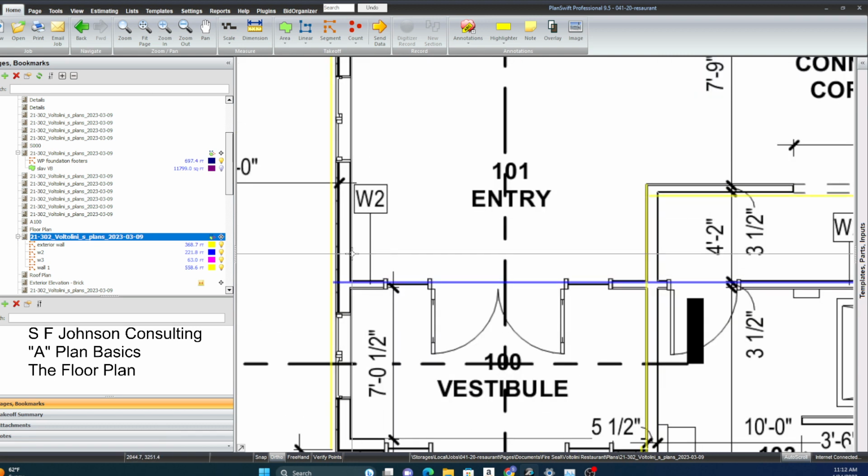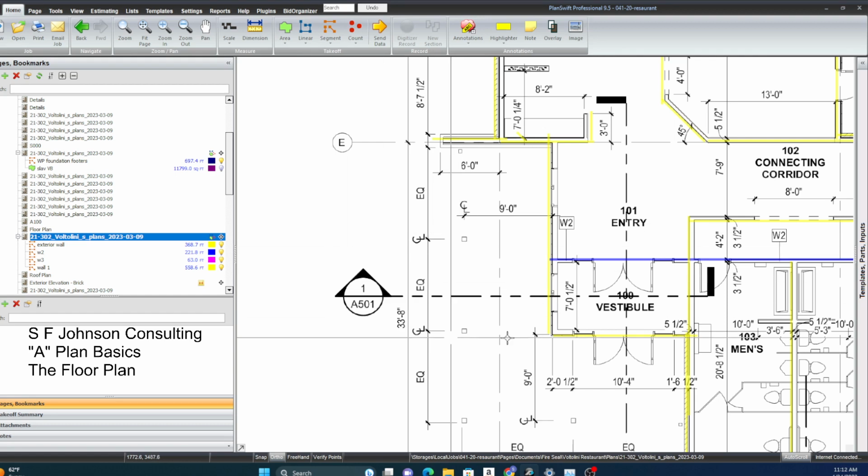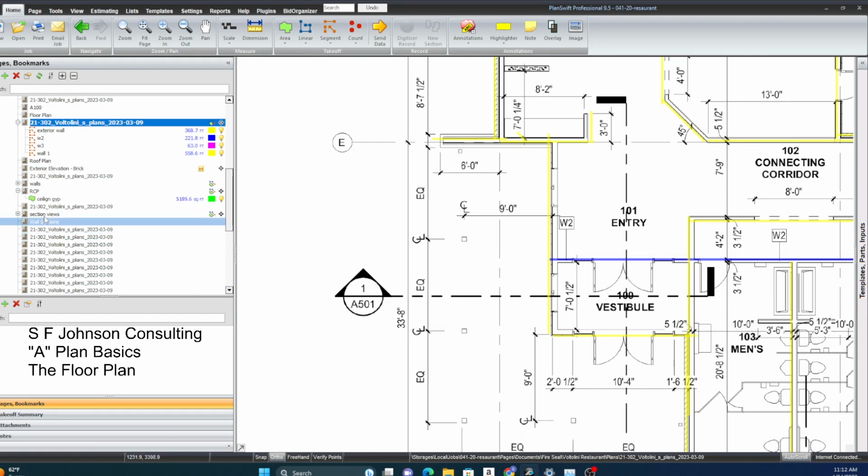It's the tag that's connected to the wall that describes the wall. So like we saw before, there's a wall schedule giving us how this wall is to be constructed. So the plan view is going to give you one thing you need to build the wall. The other thing you need is to go to the section views for the height. Right? So 1/501.